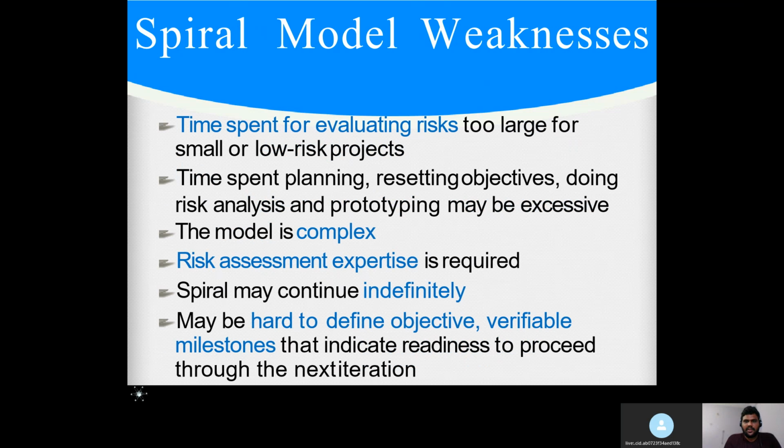The time spent in evaluating the risk is too large. So these are the drawbacks. The time spent evaluating risks is too large for small or low-risk projects. Time spent planning, resetting objectives, doing risk analysis and prototyping may be excessive. The model is complex. Risk assessment expertise is required and the spiral may continue indefinitely. It may be hard to define objective, verifiable milestones that indicate readiness to proceed through the next iteration.